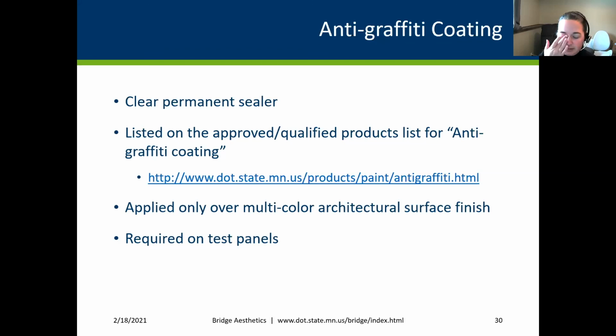You will also see that we have test panels for all of this. So they have to do the texture, the color, and anti-graffiti coating all on a test panel to make sure that we can do that. Test panels are really important because they are basically a contractual document to an extent.